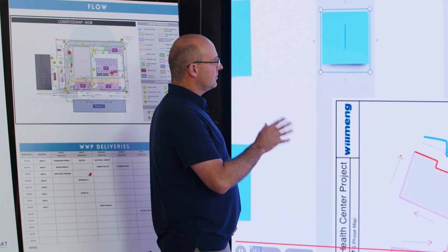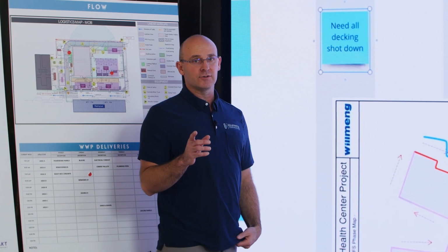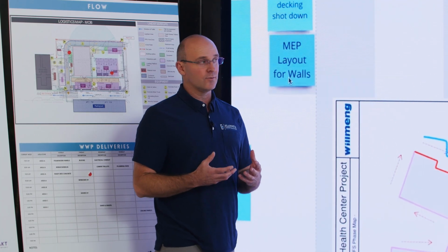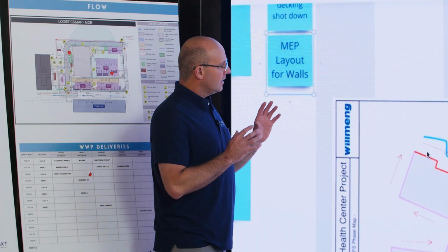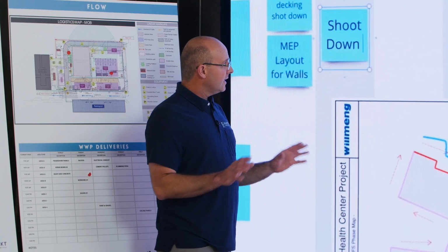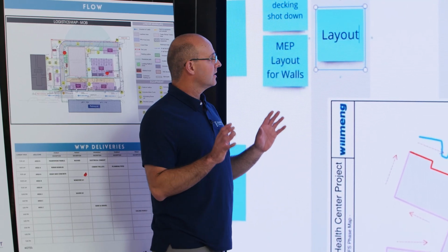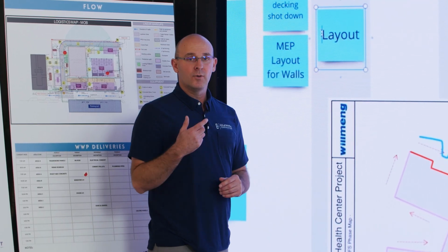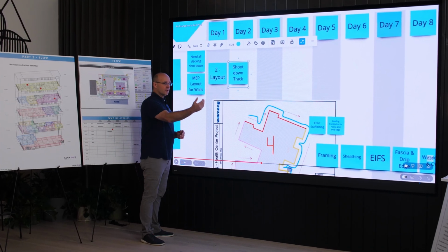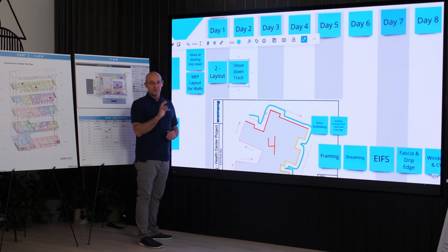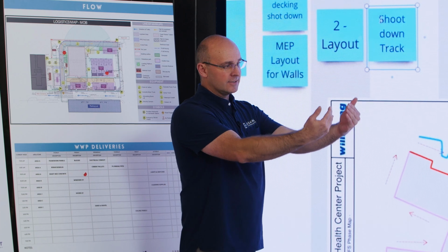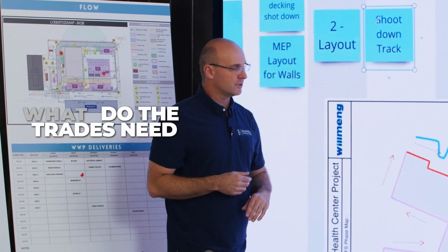And what the trades are doing, and by the way, you'll have this video to watch, you can hear it, make observations. I would encourage you to ask yourself what's happening. What the trades, who are brand new to this process, are doing is they're declaring their stickies. So I'm asking, what is the first activity? It doesn't matter if you go forward or then back, or back and then forward. The forward is what does the job need? The back is what do the trades need? You'll see that in just a minute.